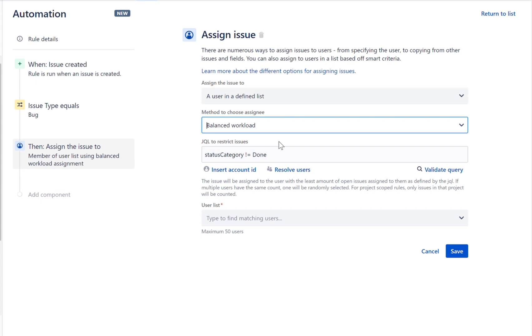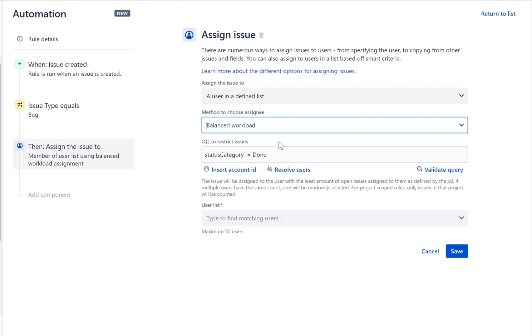For the method to choose assignee, you will see various options. With the balanced workload option, whenever an issue is created, it searches for a member of our team with the least amount of open tickets. You can restrict what is considered as an open ticket with a specific JQL. In this example, open tickets are issues that are not in the done status category. If users have the same count, they will be randomly selected.